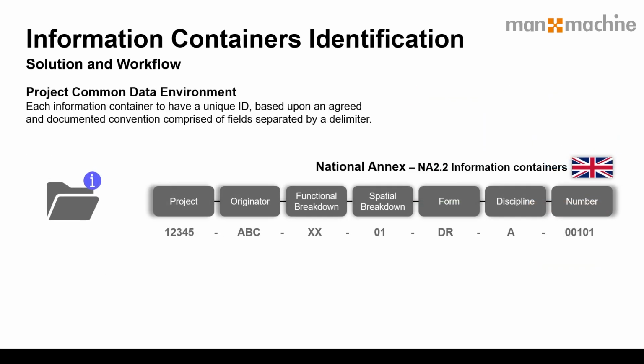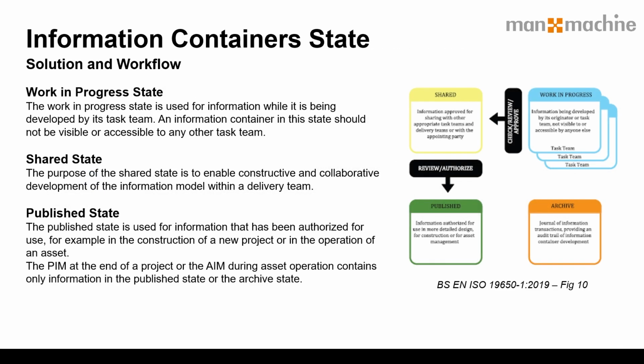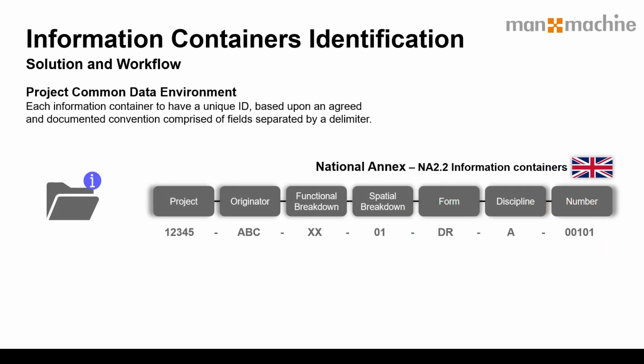Now also as part of this, and I've just remembered I've gone back, there's also a consideration to have archive information, so keeping a record of all the information that's provided during the project. So, all previous revisions and so forth, keeping a record of that people can access. So as part of the Part 2 document, it asks the appointing party to establish a CDE or outline a CDE as part of this.